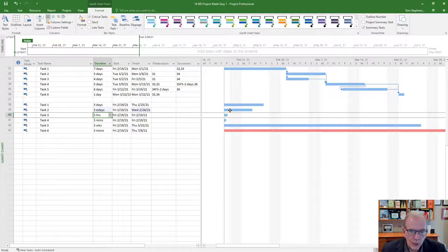That shortens that, but what it's doing is counting the weekend as elapsed days. In construction, for example, if we had 7 days for concrete to cure, you'd probably want 7 days, ED. It's not like the concrete hits Friday night and says, oh, it's the weekend, I'm going to stop curing. No, you want it to count those days right through the weekend. So that's a quick shortcut.